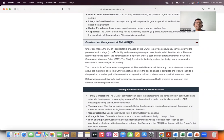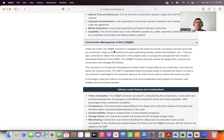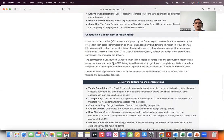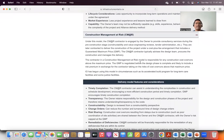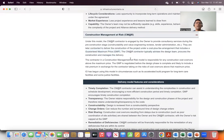They are later contracted to deliver. Basically, this construction consultant or construction company is later contracted to deliver the construction project. Now, one of the key things to remember is that this contractor in a construction management at risk model is responsible for any construction cost overrun. There is something known as guaranteed maximum price, so this contractor is taking on a risk.